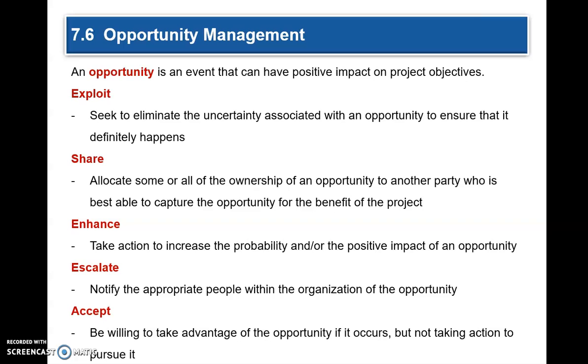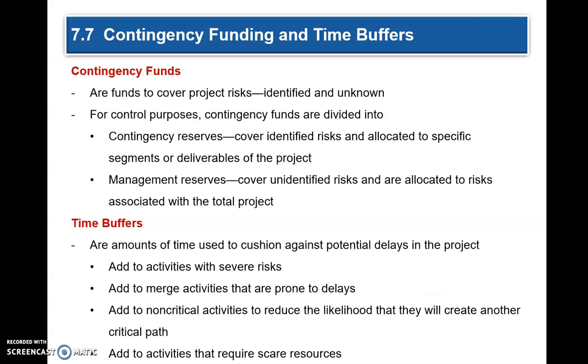You can notify the appropriate people of the organization of the opportunity, and that means you escalate the situation. If you are willing to take advantage of the opportunity as it occurs, but not taking any action to pursue it, you're accepting it, but you're not doing anything about it. To cover contingency plans, you need to have contingency funds. These contingency funds are to cover project risks.